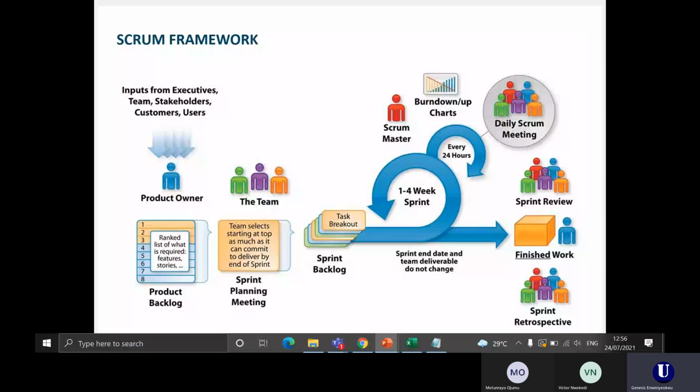So what did we do well? A retrospective of what went well in the sprint that just ended, and also what did not go well. Is it that we don't have effective team collaboration? Is it that the staging environment wasn't stable? So you get to gather all those feedbacks, and then you now look ahead to the next sprint. What should we change? What should we do better in the next sprint? So that is what your Scrum framework is all about. This is just an overview, a straightforward, direct, detailed explanation of what Scrum is and what your Scrum framework is.